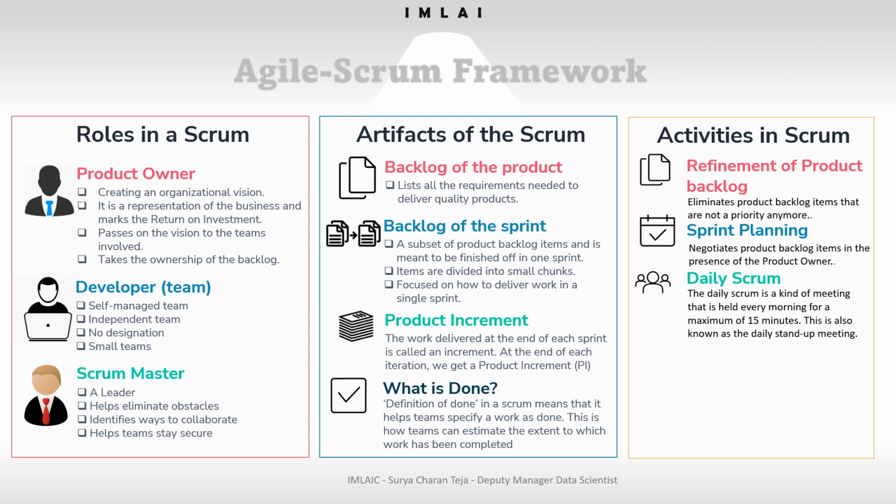It covers what my contribution at work was yesterday. In the daily stand-up meeting, the scrum master and the developer team, everybody will be there, and we convey the things we did yesterday and what we're going to do today, and whether we faced any issues yesterday or are going to face any challenges today. All of this is discussed within the team in front of the scrum master. The scrum master makes all these arrangements. He makes sure the daily scrums are conducted, everybody attends, and the whole process goes seamlessly.